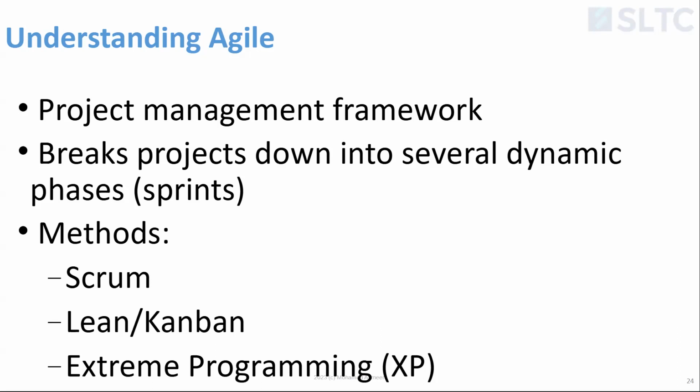So that's one example. If you're looking at the accounting application I took earlier, the first sprint might be to look at, let's say, the cashier module, right? And then the general ledger module in the first sprint. So you can have maybe 2 teams or 4 teams working on those. And the second sprint might be to bring in other modules, let's say the payable module, banking module, and receiving module, things like that. So when you do that, it's easy for everyone to know what is going on. As we move forward, we will see the details. It is actually a very flexible way of getting things done.